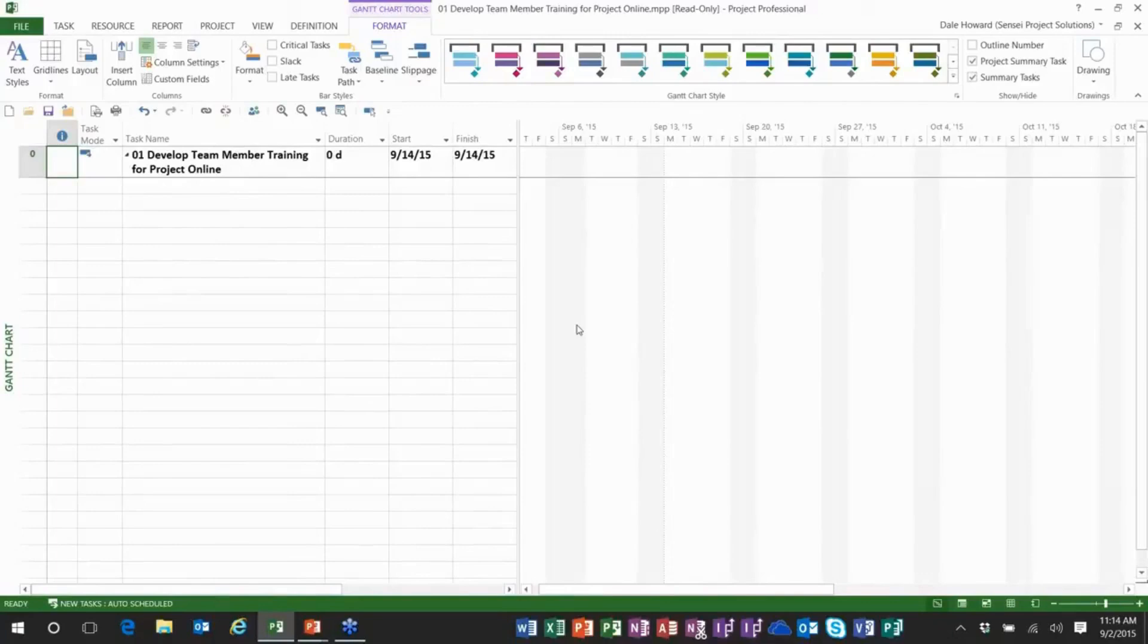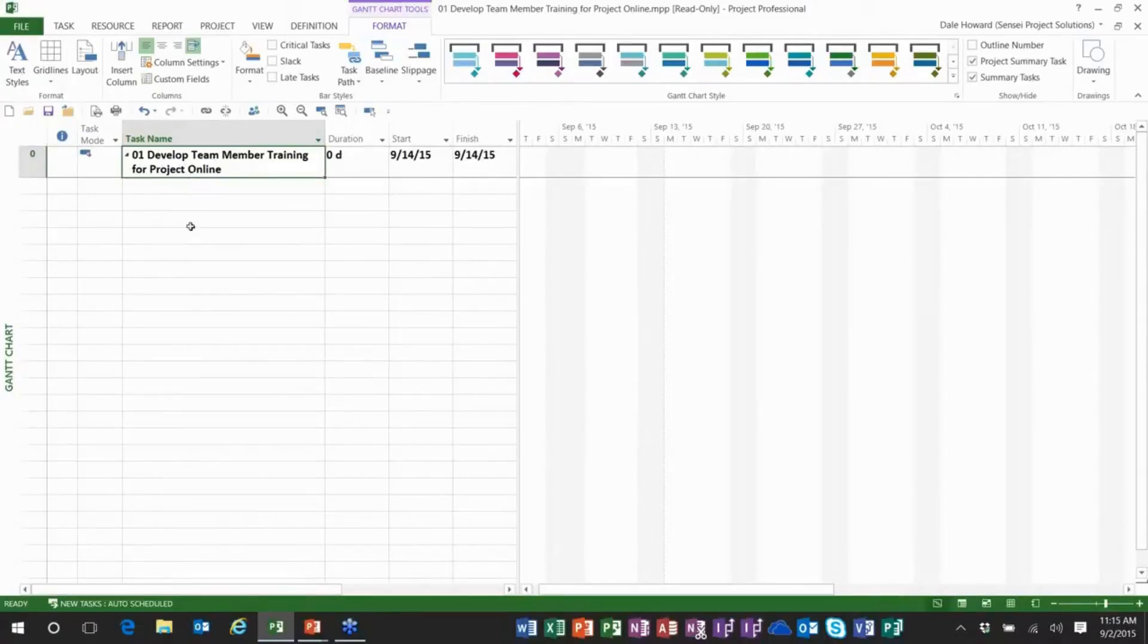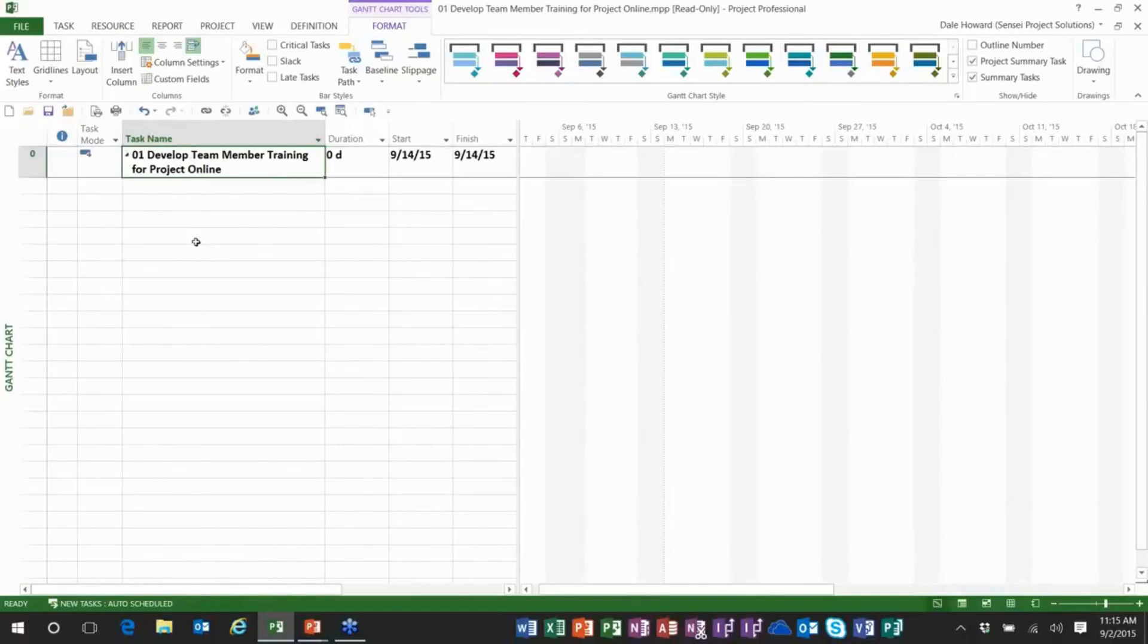Now I do want to tell you about a bug that is in Microsoft project 2013 that has not been fixed as it relates to the project summary task. If you try to rename the task name for row zero, the project summary task, it'll let you do it. When you save and close your project and reopen your project, it goes back to being the file name again. That is a known bug. It has not been fixed yet. So, folks, that's how to display the project summary task.